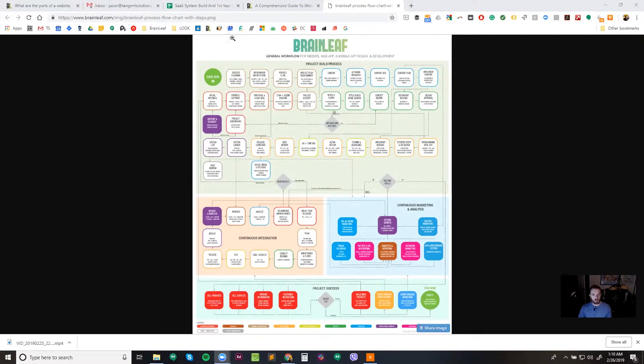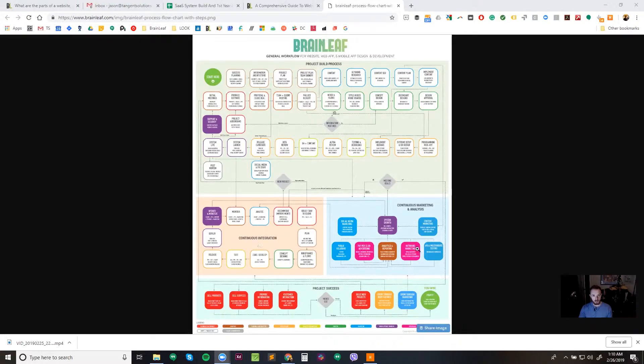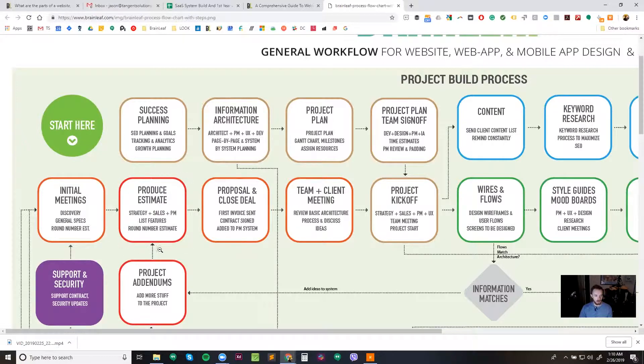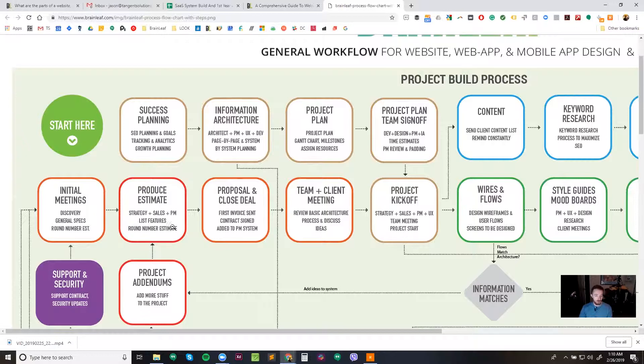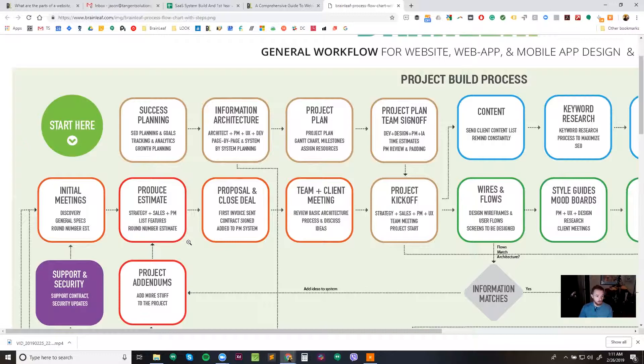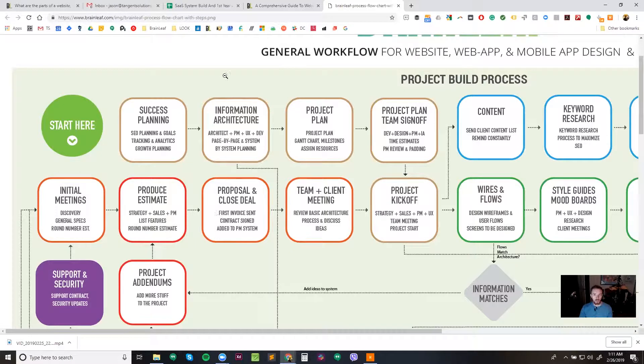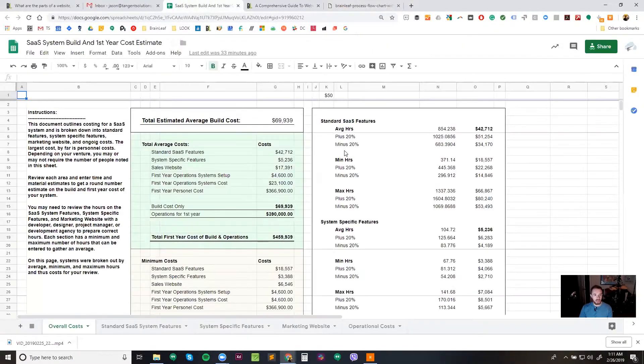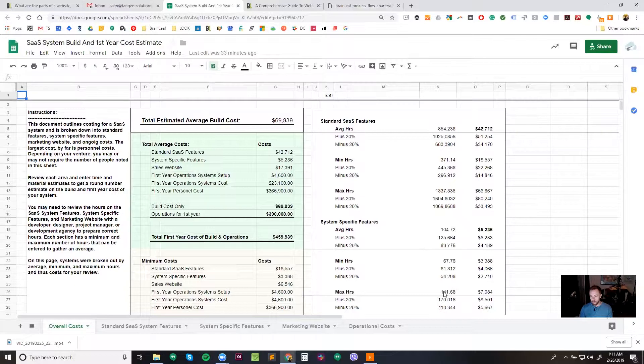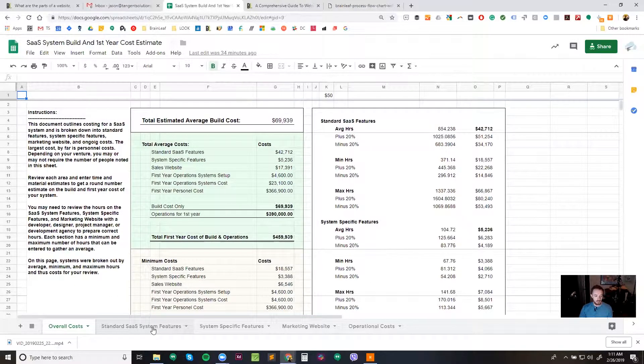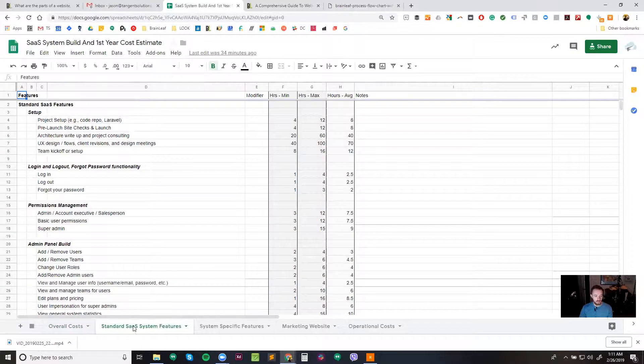So we're going to get started with just showing you where in the process we do all of this. This is our standard SaaS or large project build process. And the item we're going to be looking at is this one right here, this produce estimate item. So this takes a strategist, a salesperson, generally a project manager to put together, and we're going to list out all the features, some of the pages, all of the major tasks, and we're going to produce this round number estimate. And we're going to do that with this SaaS build spreadsheet. So before we get into this overall cost page, let's get started by looking at the standard SaaS system features.